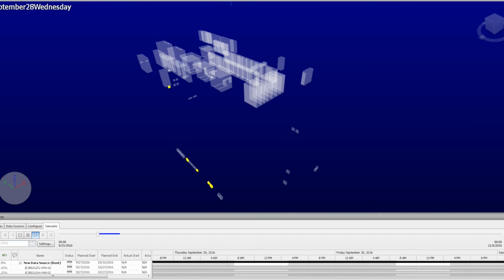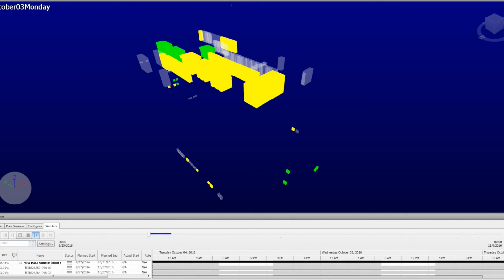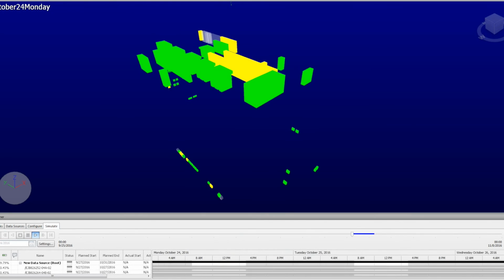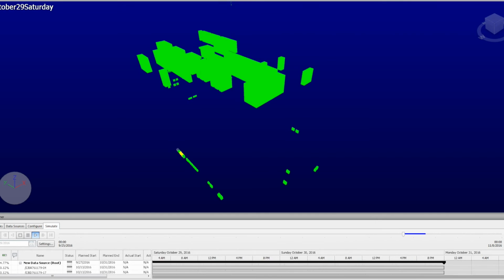Having applied a bulk cable pulling approach, the next question was going to be, what does the termination sequence look like? So the yellow here signifies when a device or a panel has its first cable pulled to it, and green when the final one is. You can see on about the 14th of October we have a huge volume in the northeast corner where we can actually get in and fully gland and terminate all the cables, which means we can have all these parallel activities, which actually opens up commissioning work front sooner without the need of going into a SimOps environment.